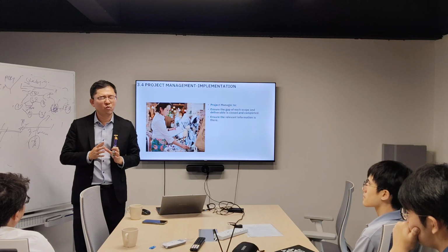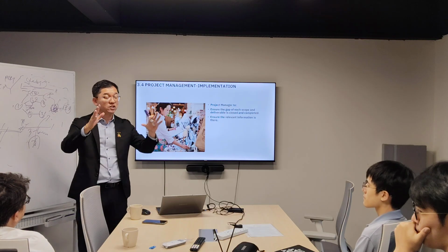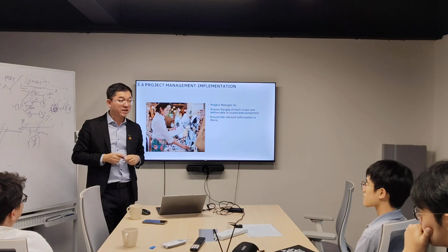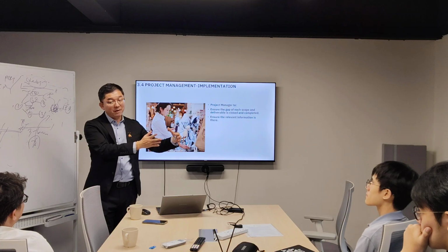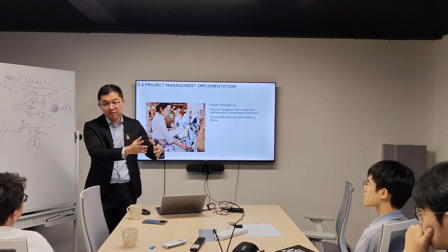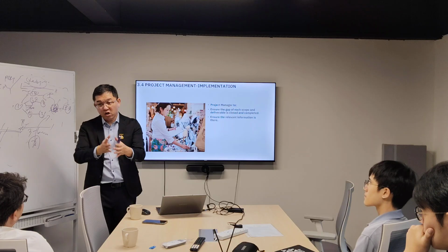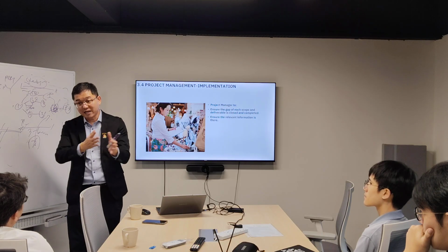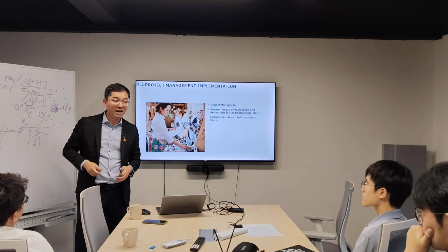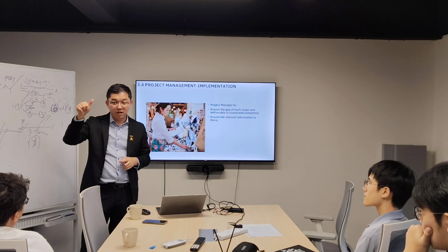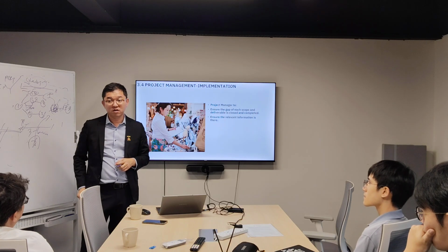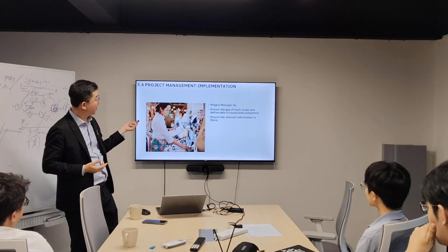We cannot wait until they construct. If there's no proper process to submit the material, get it approved, then procure, and only then implement, and you directly allow them to implement, then you will have the risk of schedule delay and rework. So that's why we need to plan ahead.